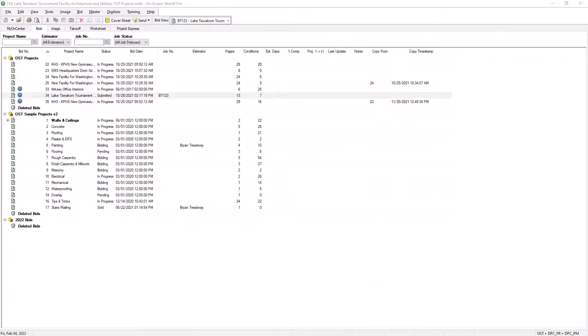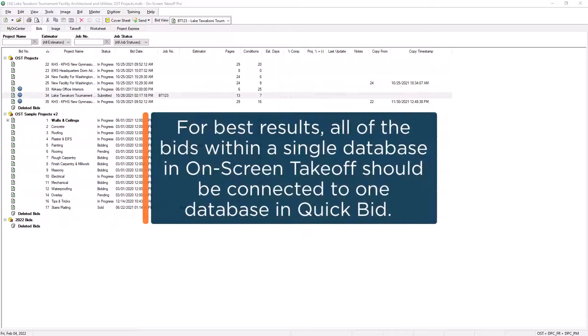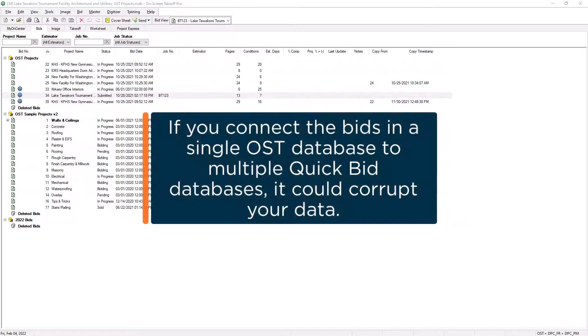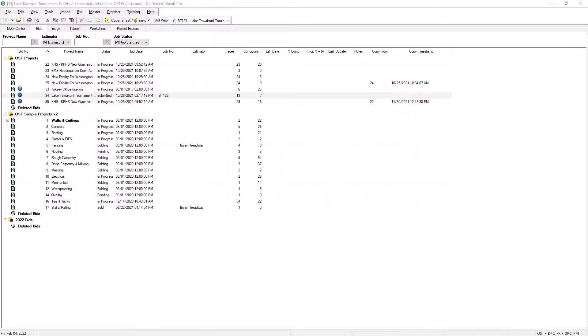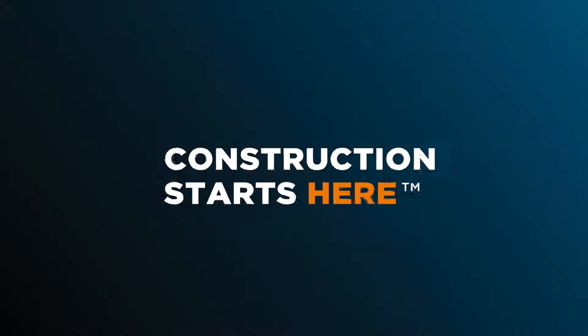It is recommended that you are consistent when connecting bids from OST to QuickBid. All of the bids in a single database in OST should be connected to the same database in QuickBid. If you have multiple bids in an OST database connected to multiple different QuickBid databases, you risk corrupting the database. For best results, the relationship between OST databases and QuickBid databases should always be one-to-one.